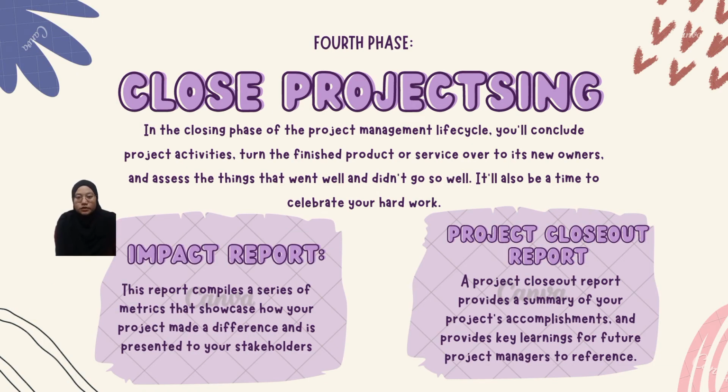The last one, or the fourth phase, is close project. In this closing phase of the project life cycle, you will conclude project activity, turn the finished product or service over to its new owner, and assess the things that went well or didn't go so well. There also might be a time to celebrate your hard work. Okay, then the steps that we will need to use are conducting a retrospective and taking notes of changes you can implement in the future.